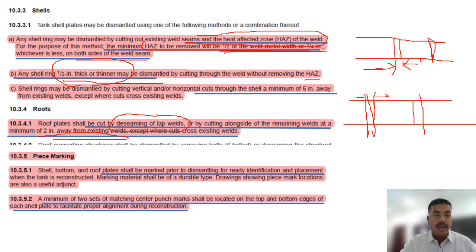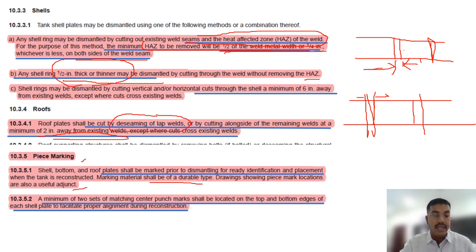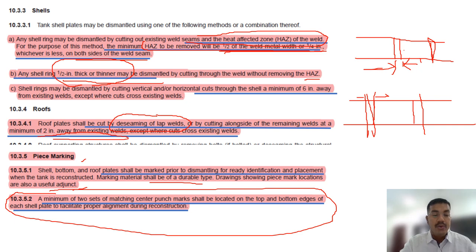Piece marking is important and usually comes in the close-book exam. Shell, bottom, and roof plates will be marked prior to dismantling for ready identification and placement when the tank is reconstructed. Marking materials will be of a durable type. A minimum of two sets of matching center-punch marks shall be located on the top and bottom edge of each shell plate to facilitate proper alignment during reconstruction.